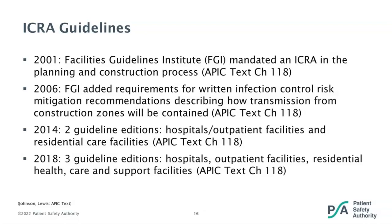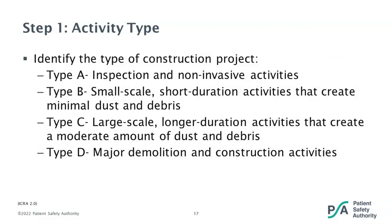The template we will be using in this presentation is from the American Society for Healthcare Engineering. Their updated ICRA 2.0 tool was released last year and is available to download from their website at no cost. This is not the only available tool, but it is widely used and lays out the process in a very user-friendly fashion. The first step in this tool is to determine the activity type. The types range from A to D: Type A — inspection and non-invasive activities; Type B — small-scale, short-duration activities that create minimal dust and debris; Type C — large-scale, longer-duration activities that create a moderate amount of dust and debris; and Type D — major demolition and construction activities.